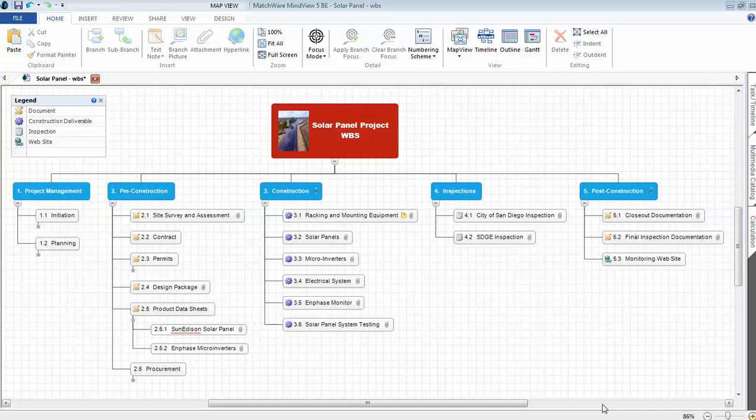Welcome project managers. Today I'd like to present an update to the solar panel project WBS. Great news, the solar panels were installed on December 1st, 2013. Not operational yet, we still have to go through the city permit and also the utility company permit.